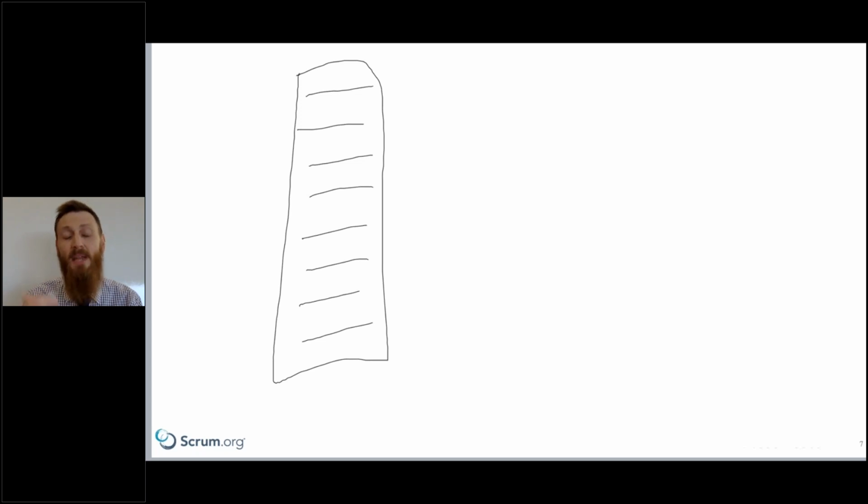But some guidelines: up to 10% of the dev team capacity, one guideline. Another guideline, and again, that's up to 10%. It doesn't mean you should strive for that. It just means if you're doing more than that, there's a likelihood that you might be going too far forward. So that's what I'm about to draw here. Let's say that on average, we've been getting 2 PBIs done a sprint for this simple example. I'm not going to size them here. So let's say this is sprint 1 and this is sprint 2.